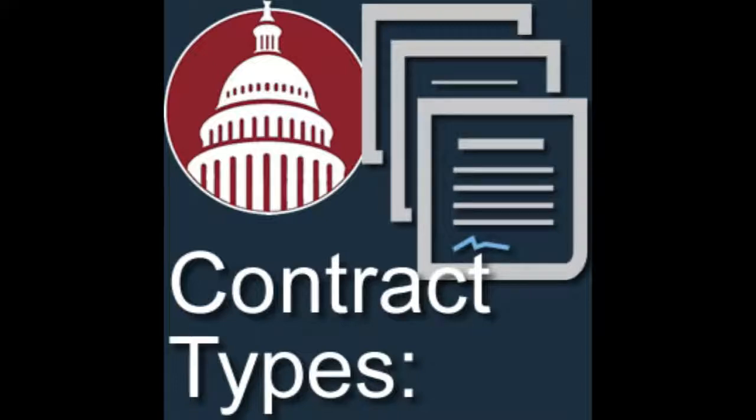So for more sophisticated buys, this is what makes the government world unique. The government may actually require you from the industry side to give them cost and pricing data so that they can verify not only that you're making a fair profit, but that you know how to meet their requirement and that you're not going to go out of business trying to deliver what you've promised at way too low a price.